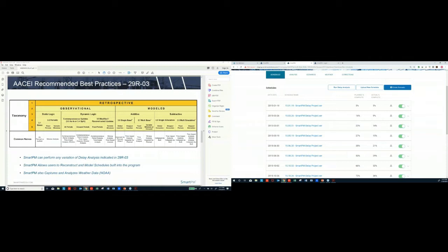And then once you start to find problems in those schedule files, for instance, there's missing logic, there's too many activities with like 90 days of duration that continue to hijack the critical path, things like that, you need to then run a modified reconstructed version. And this is really where consulting dollars go through the roof, because you're having to manually go into schedule files and make changes, and it literally will double your cost for a consultant, because you have to actually manually make decisions. And actually, when you start making those decisions, it's very hard to bring them back to light when trying to negotiate. And the whole reason most of us do delay analysis these days is to argue who caused the problem.